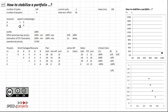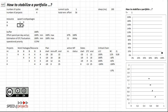Now again, how could Critical Chain help? We're going back. We're not adding resources here; we use the resource for something else. We do not add four resources, we just use one resource more, and this one is flexible. That means in the mean you have not two persons working for work packages but three, and that's nothing else than you can spend a little more on the most critical work package.